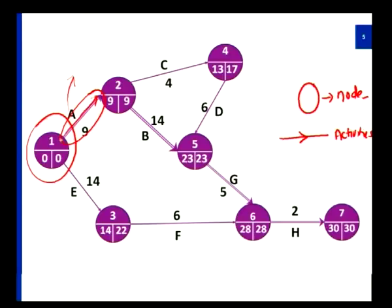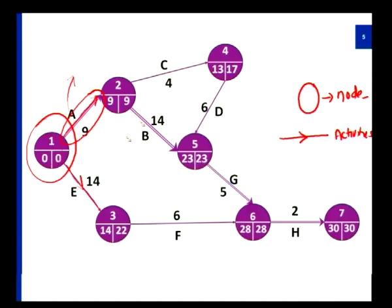By my understanding of the previous table, A and E are two different activities which do not have any prerequisite. I start with A here and end up somewhere after some point in time. At the same time, I can also start with E — it need not end at the same time as A. E also takes a particular time and flows through the other flow in the diagram. After completion of A, B and C are the two parallel activities I can continue. B and C are done in parallel. After completion of C, I can start with D. B and D then join together, making an initiative to start with G.